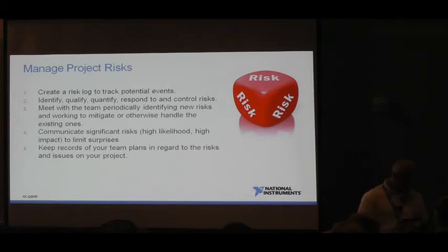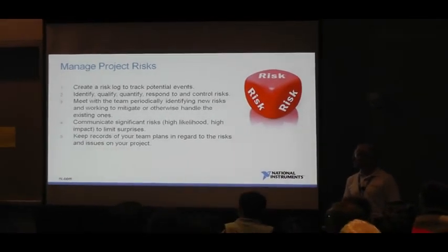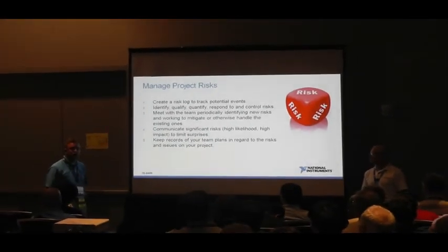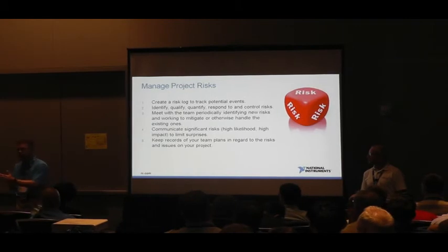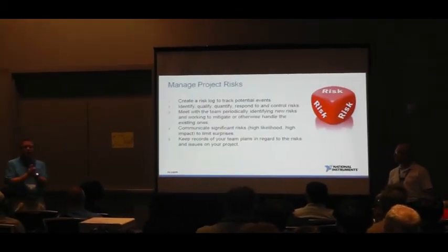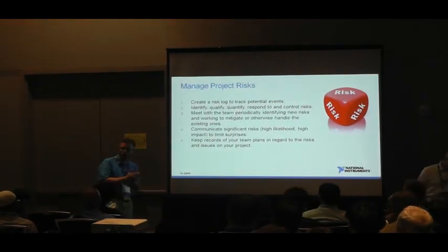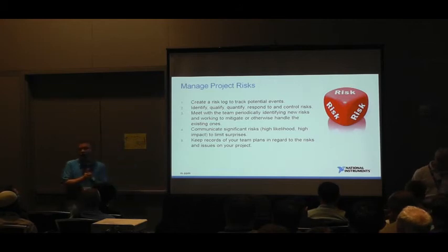So one thing you might keep in mind too is identifying risks up front can be very helpful when you're quoting a project. You know, identifying those risks, saying, hey, there is a potential for a problem here. You need to really leverage the experience you've had in the past and say, I've used this kind of equipment before, and these are the kind of issues we might come up against.